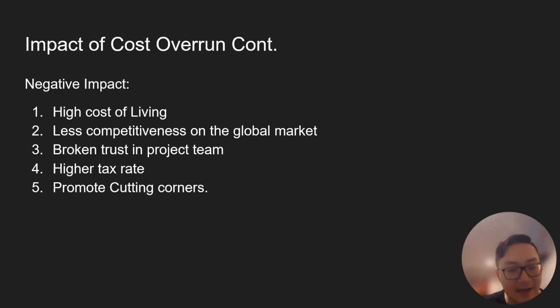And there's a negative impact. First of all, really high cost of living, and that is a major factor in play in Vancouver right now because of how expensive it is to build a home. I'll give you guys an example. I was building houses at like 250 square feet, 200 square feet, and now we're looking at almost 300 per square foot for the project that I was doing, which is crazy. That's a $50 per square foot increase, and as a developer, my old company was a developer.